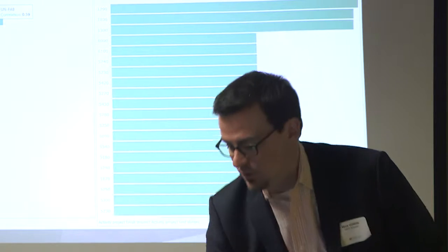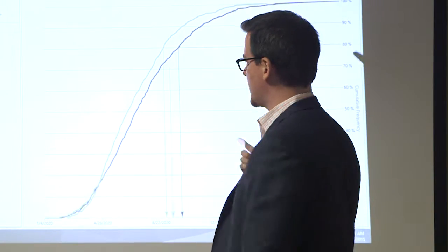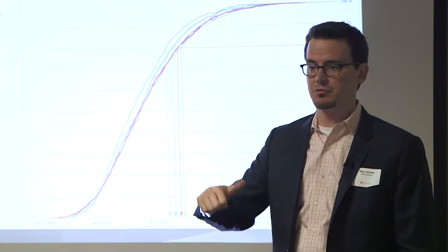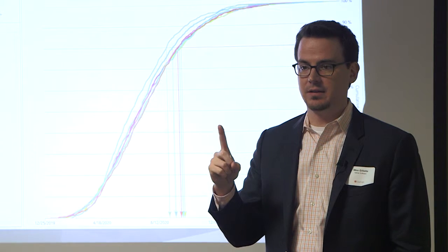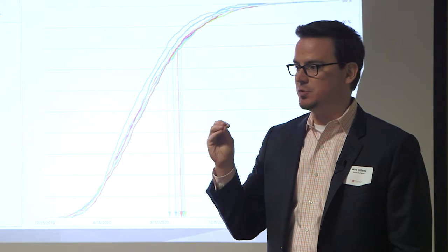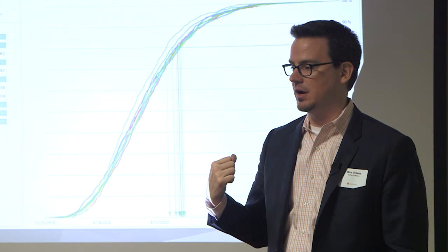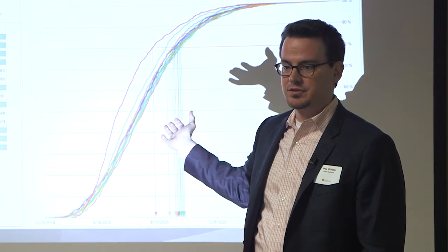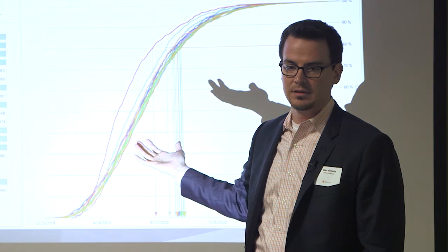So we said we can give you more. We designed something called schedule sensitivity by exclusion. And this will take a couple seconds to run, because what we're actually doing is rerunning the analysis multiple times, right? Right now I'm rerunning the analysis over and over again, each time extracting out one risk at a time, so I can isolate the individual impact of that risk from a schedule and cost perspective to my project, right? So I'm not running one analysis. I think I've got 25 risks in this risk register on a 300-400 activity schedule. You're seeing how well we run, right? We're fast.